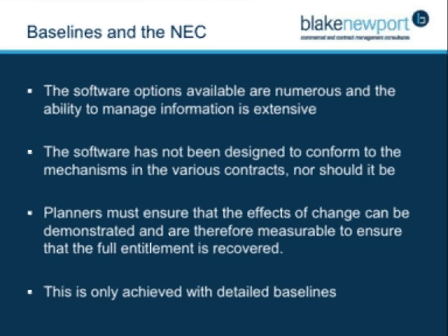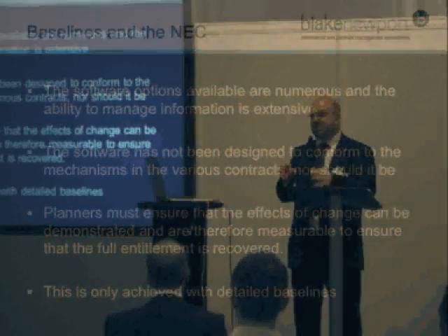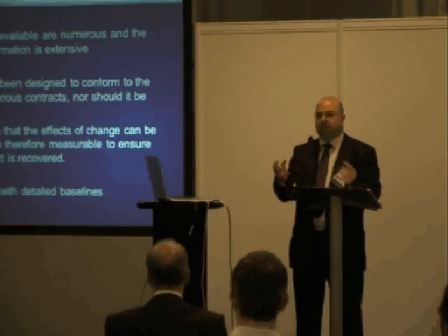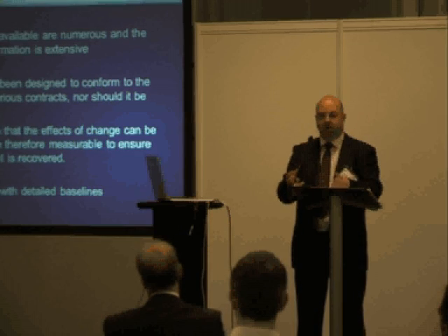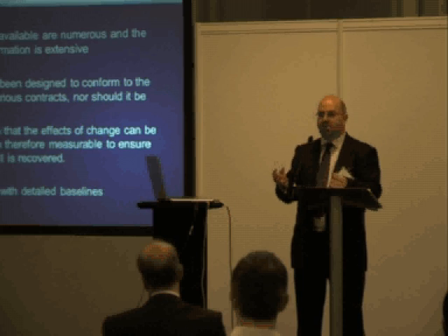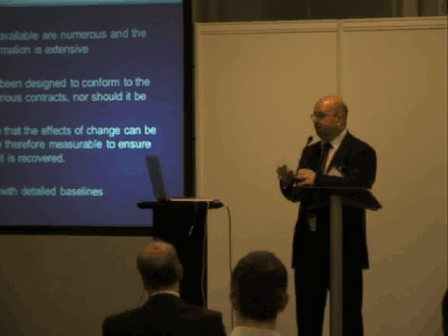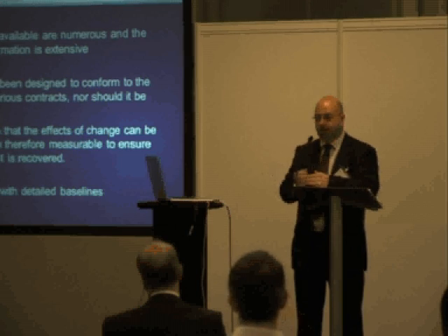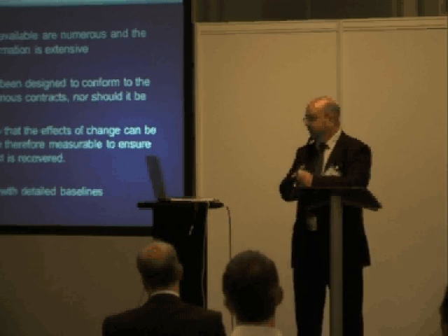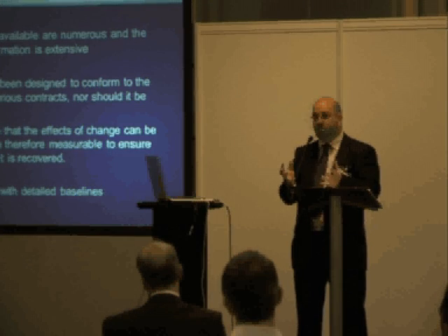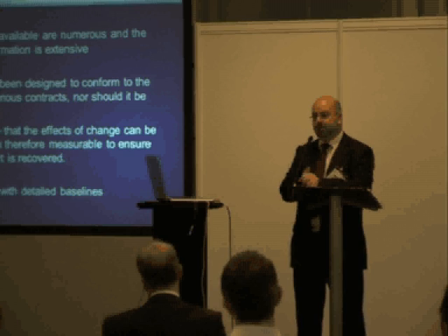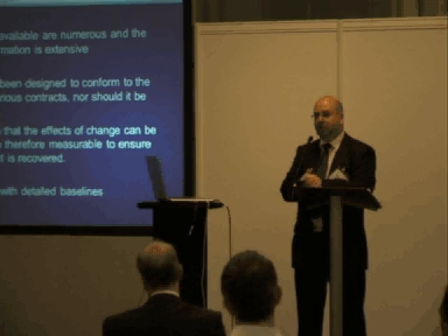The software options available are numerous, and the ability to manage information is extensive. The software has not been designed, however, to conform with the mechanisms in the various contracts, nor should it be, because it's not going to be tailored to our specific requirements. So as planners, we need to make sure that we understand the software well enough to be able to represent the contract mechanisms in the programme itself, to make sure that we maintain our employer's position. Planners must ensure that the effects of change can be demonstrated and are therefore measurable to ensure that the full entitlement is recovered. This is only achieved with detailed baselines.